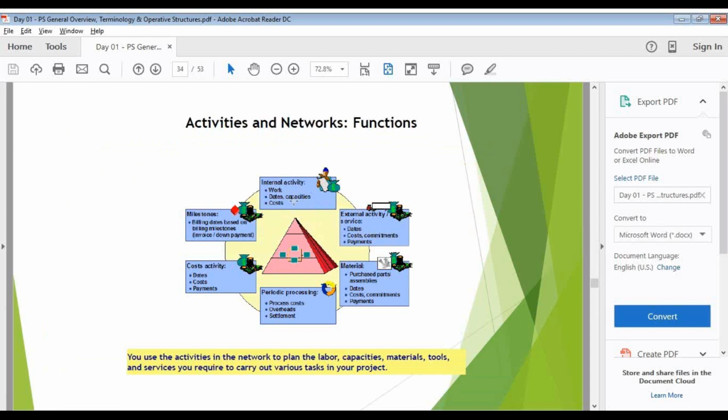In project management terms, whenever I'm using a resource, skills, the cost will be incurred. I'm not going to pay my internal employees. I'm only going to capture their per hour cost. This per hour cost I will plan through KP26. How this will trigger: the work center I use in my internal activity tab, the plant, and the activity type I use in my internal activity tab. I will be defining my activity type in my internal activity tab.